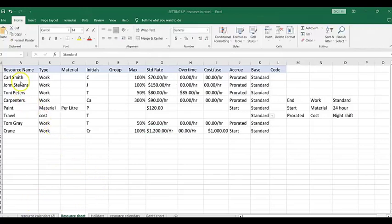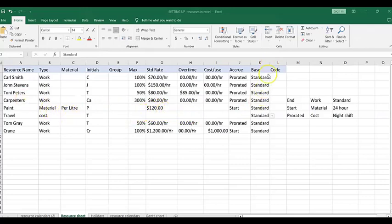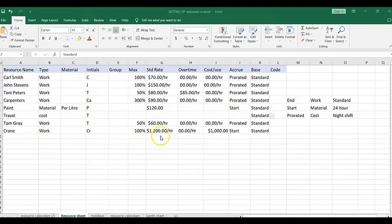Let's quickly review what we have. We have all the work materials. Paint has per litre as the unit — it does not have maximum units or overtime, just a cost per unit, so each litre will be $120. The standard calendar cost does not have any monetary allocation. The crane is work and has a cost per use, and can also have an overtime rate if working overtime, with a standard rate in terms of per hour.